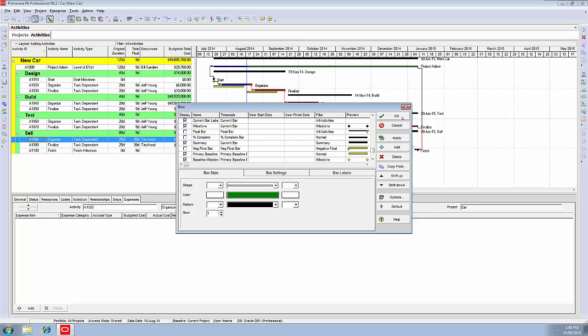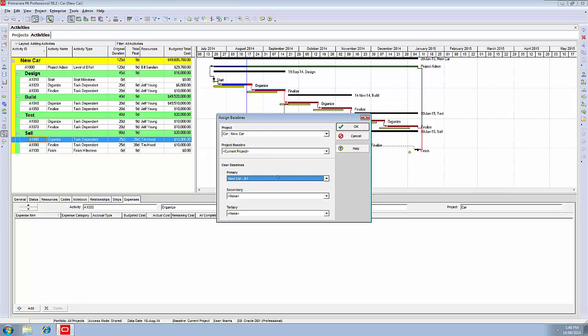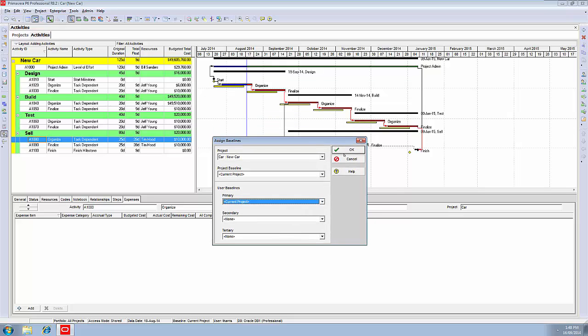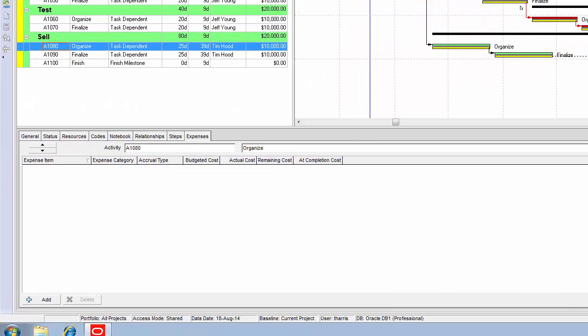Now, I just wanted to show you what would happen if we had this ticked in here in the bars dialog, but we hadn't assigned the milestone. We've got slippage indicated, which is correct at this moment in time. If I unassign the baseline now, so I take it away and make it back to current project, say OK. Notice that after the data date, everything now sits on its baseline as though there was no slippage. Because we're seeing current project. In other words, we're seeing the current position of every bar reflected in the baseline. That is in fact a false baseline, giving you entirely the wrong picture of what is going on at this point in time.